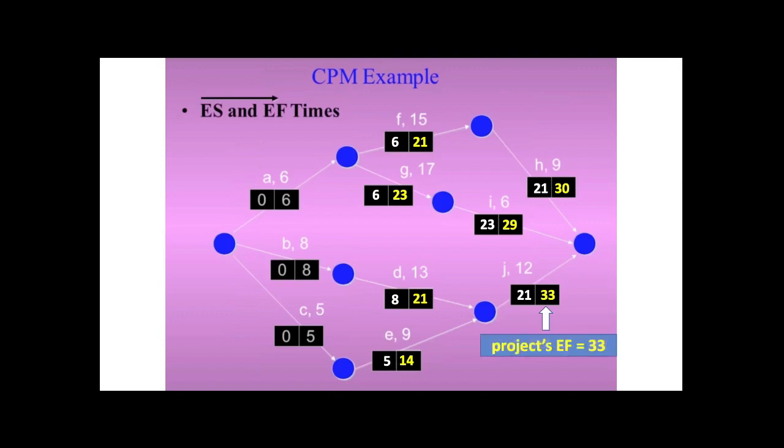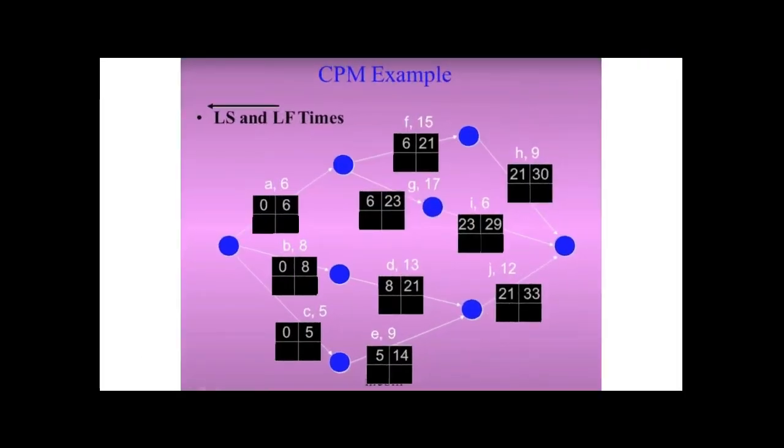Okay, and then we also want to get the LS and LF in our rectangular box, that will be the lower part. So how do we find the LS and LF? We use now the backward pass. Okay, so since we have identified that 33 is our EF, earliest finish, do you remember the mnemonic that the upper part of your rectangle are ES and EF, and the lower part is LS and LF? So 33 will be our LF here, the latest finish, and also from this activity I, we use also 33,